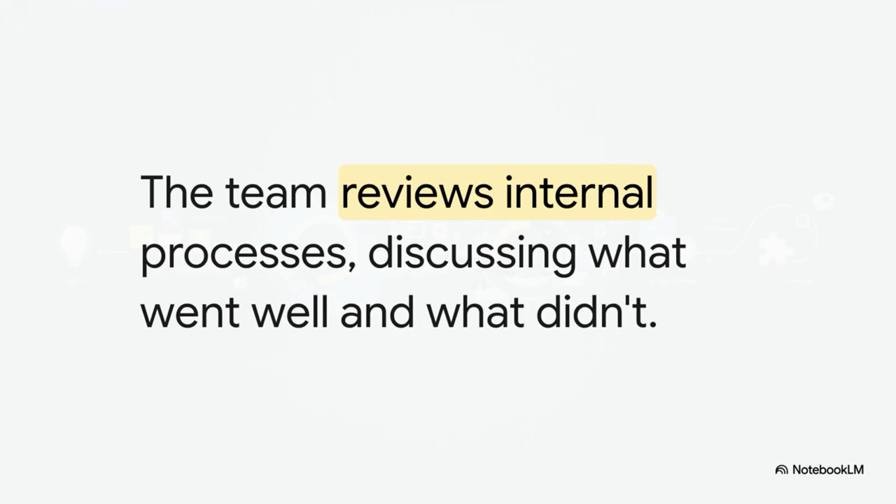Next, the team will hold a sprint retrospective session. If the review was all about the product, the retrospective is entirely about the process. The team takes a hard look internally and asks, what went well? What didn't? For instance, they might realize they wasted an entire day just waiting for the marketing team to write the password reset email copy. So, what could be an action item resulting from that? Maybe for all future sprints, they mandate that email templates are pre-prepared before the sprint even starts.